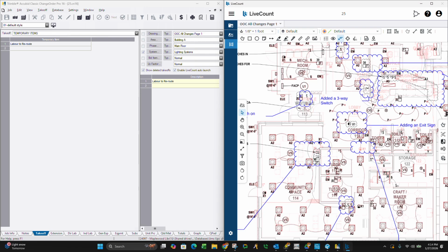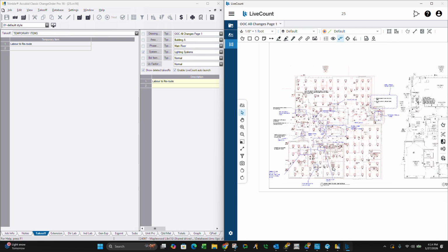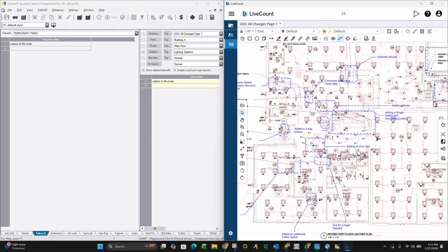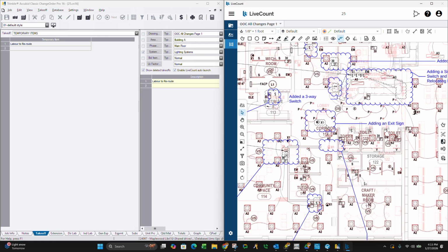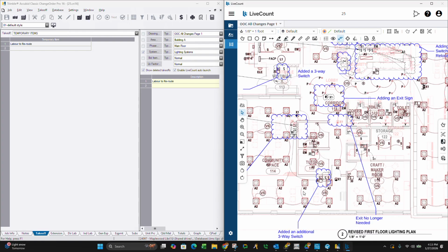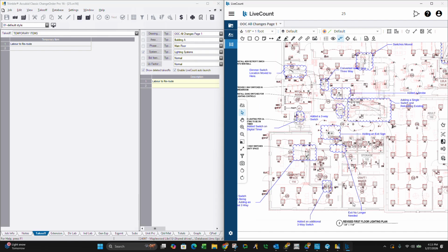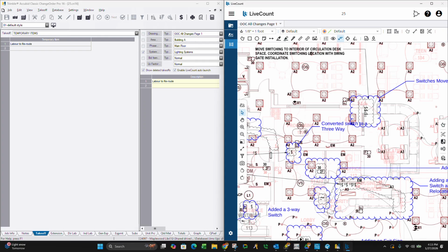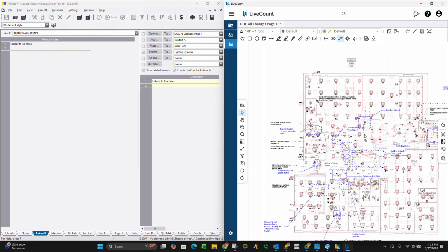Now, most of these jobs require backup for everything, so depending on whether you're the estimator or PM doing this, it's kind of annoying now because it takes forever. So I essentially would have to get a quote just for this exit sign. The switches and basic materials they'll usually accept without everything, but I don't know. Sometimes you still have to do that.